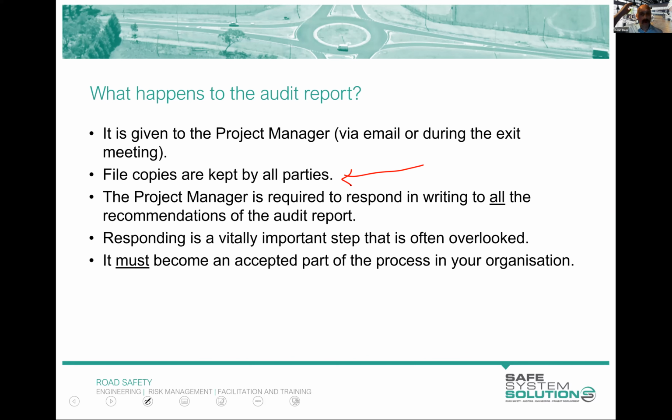The project manager is required to respond to all of them in writing, as I mentioned, not to the audit team, but just have that on record. You do not want an audit report sitting there that has a whole lot of recommendations and no commentary around, yes, they will be done, they won't be done, or the like. That's going to be a pretty bad thing if an incident was to occur. And responding is this vital part. And it must be part of organisations' processes.